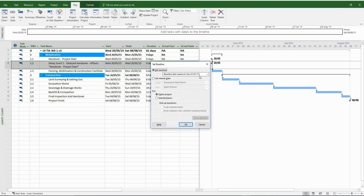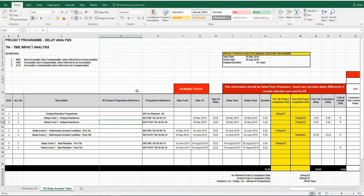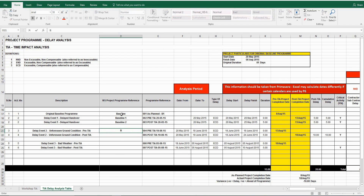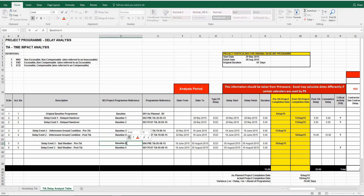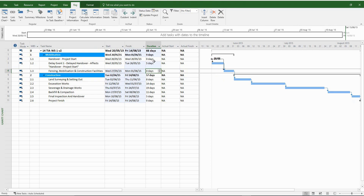Since the first delay event affects a handover milestone, you don't need to progress or update the schedule before saving your second baseline. The reference should be per the Excel table. I'm going to insert all MS Project baseline references, and your actual program reference is in the next column, which you'll be using for your delay analysis narrative. The next step is to enter the actual delay duration, which is five days for delay event number one. The impact is immediately felt — the project finish date has also been delayed. Now we can go ahead and save the baseline.